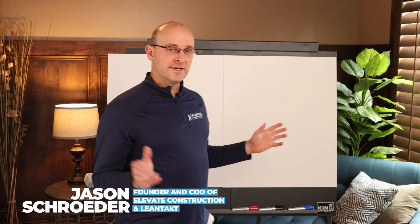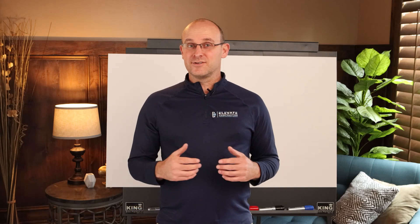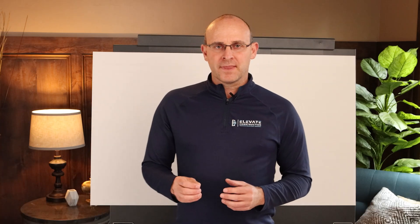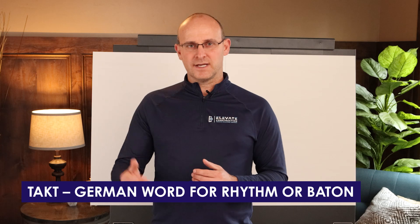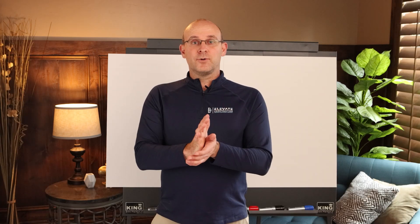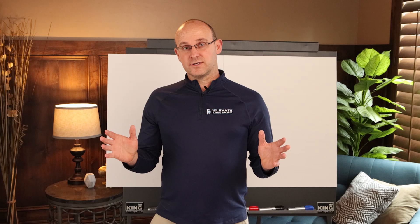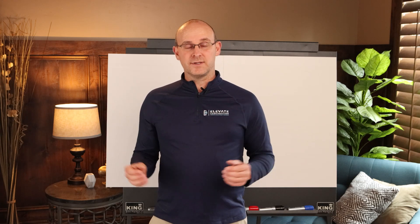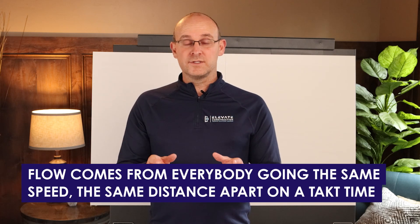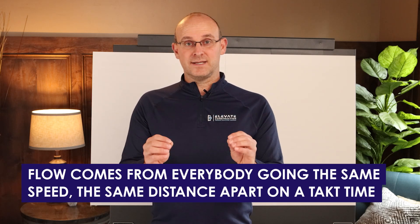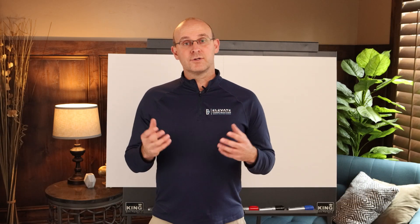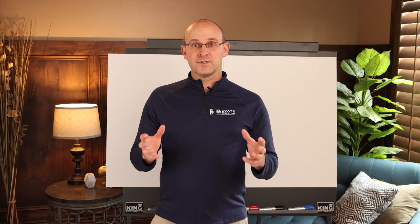Okay, so I'm super stoked to be on the flip charts because I'm going to give you some really neat things, some frameworks that you can use to just go ahead and start this tomorrow if you want. But I want you to know the word tact is the German word for rhythm or baton. It symbolizes a rhythm or being on a beat. And that's important because the general contractor on a site has got to, especially since all of our trades are separate companies, get everybody on a rhythm. Flow comes from everybody going the same speed, the same distance apart on a tact time. So when we talk about tact planning, we're talking about production planning.